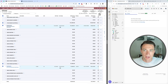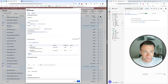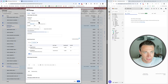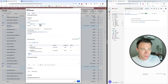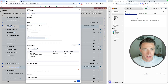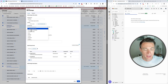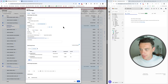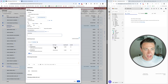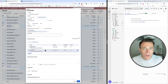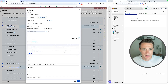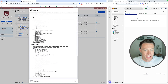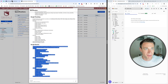From these two items I can go to 'Create a Bid Package.' This bid package — we're going to take the title and call this 'Electric.' I usually do not want to allow multiple approved bids; it really messes with the schedule deadline. I'm going to link to schedule and go to project start, and say 90 days before I'd like to have my electrical bid in. I can potentially add some internal notes. Here I have my two line items — rough electric and finished electrical. I'm just going to do a one each; they're probably going to give me more detail, but I just want the total number. I can also grab a bid package description from my specs and attach a document.